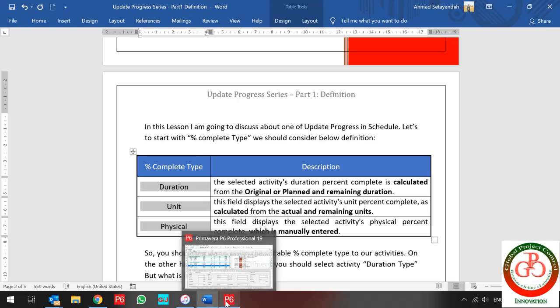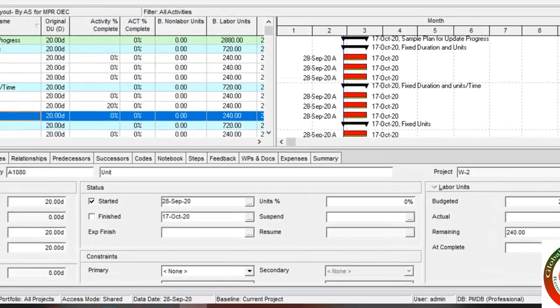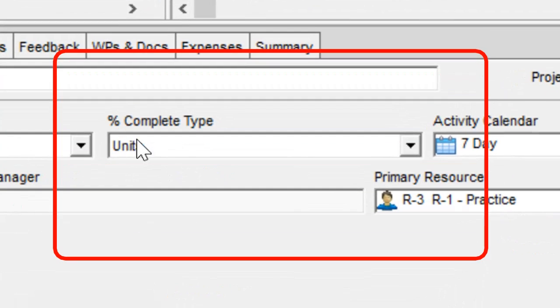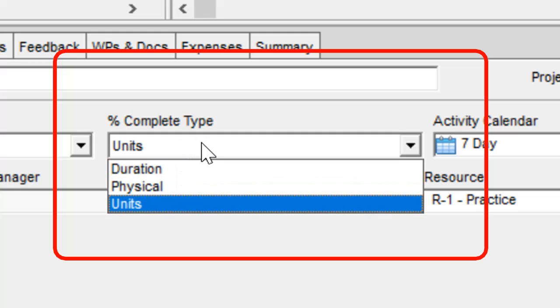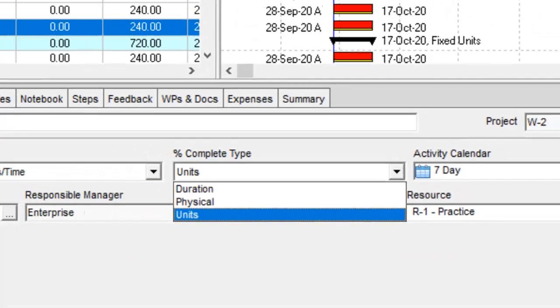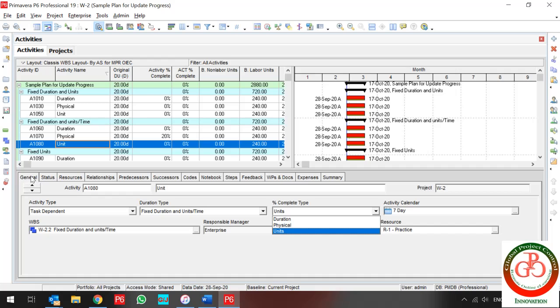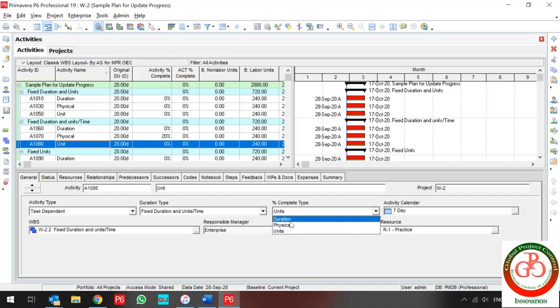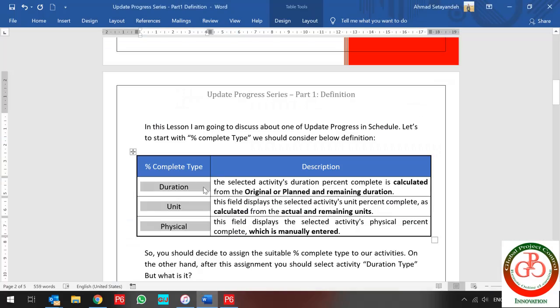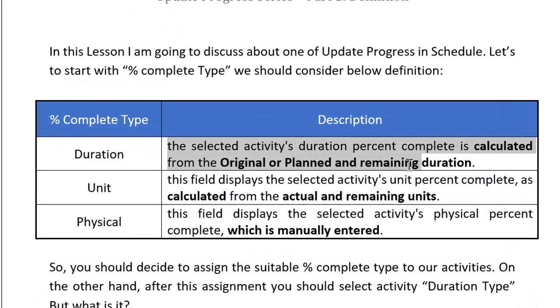In Primavera P6 you can find the percent complete type in the software. In the activity sheet, in the detail window, if you click on the General tab and then go to Percent Complete Type, you can select Duration, Physical, or Unit percent complete type.